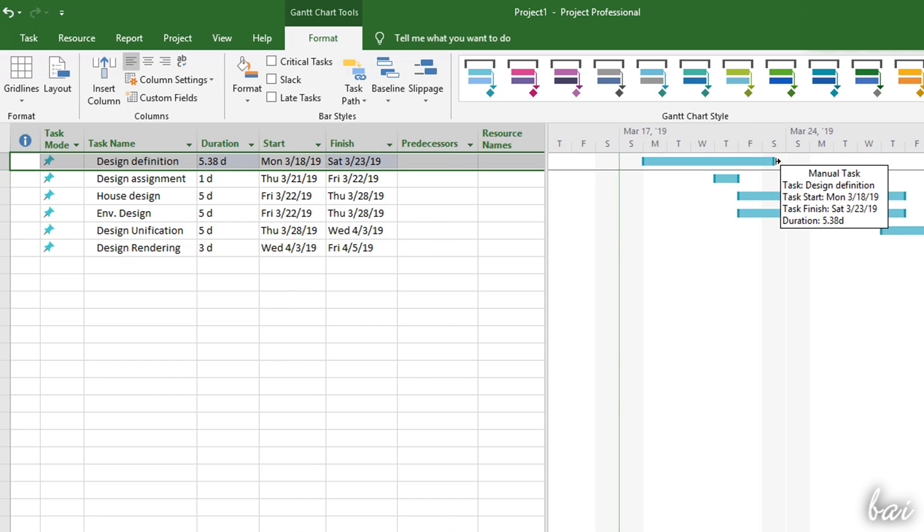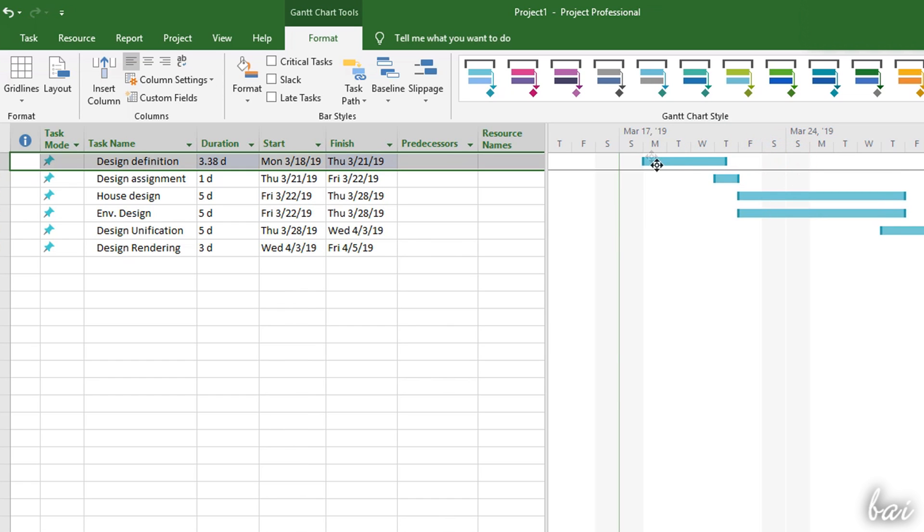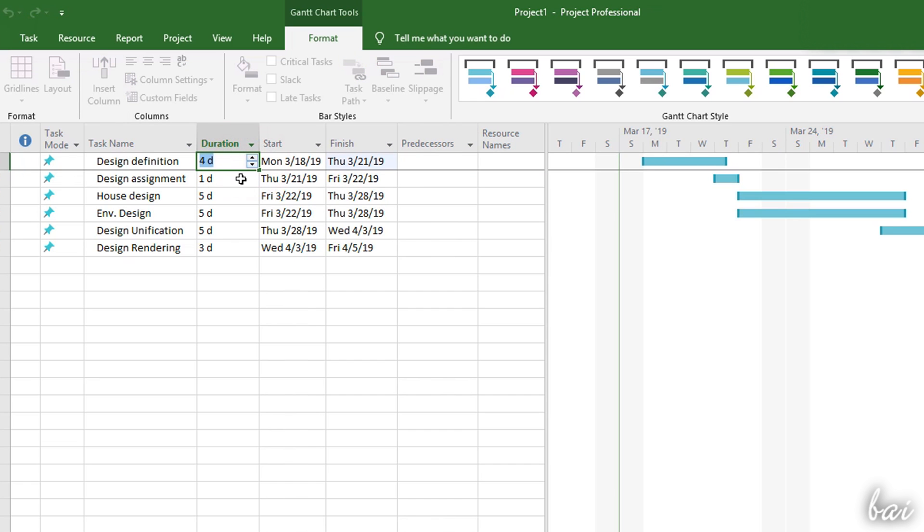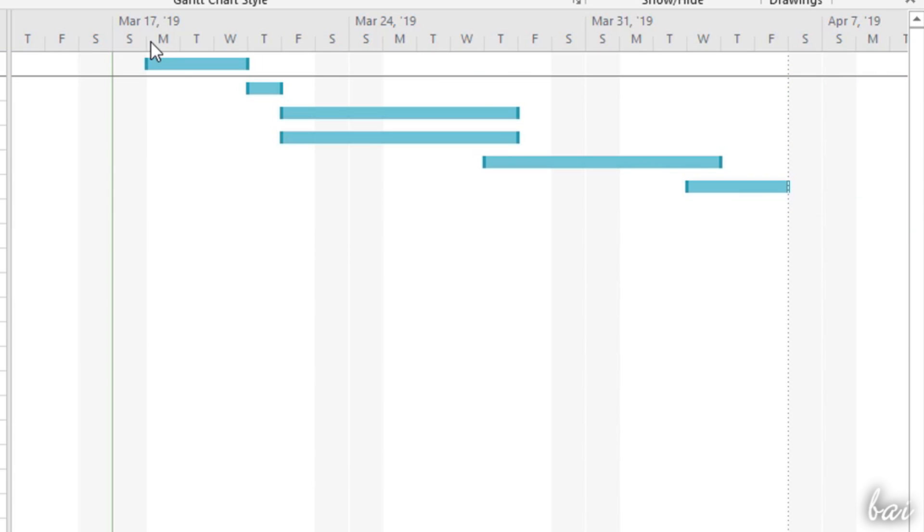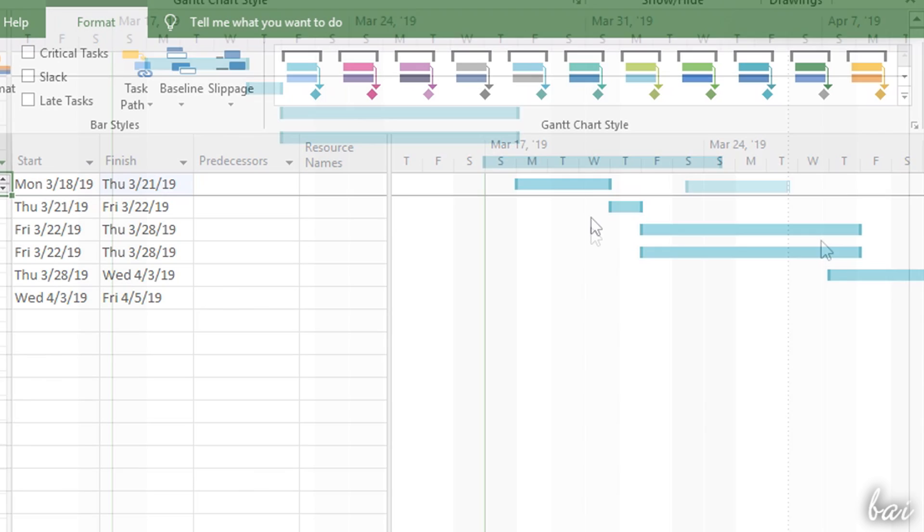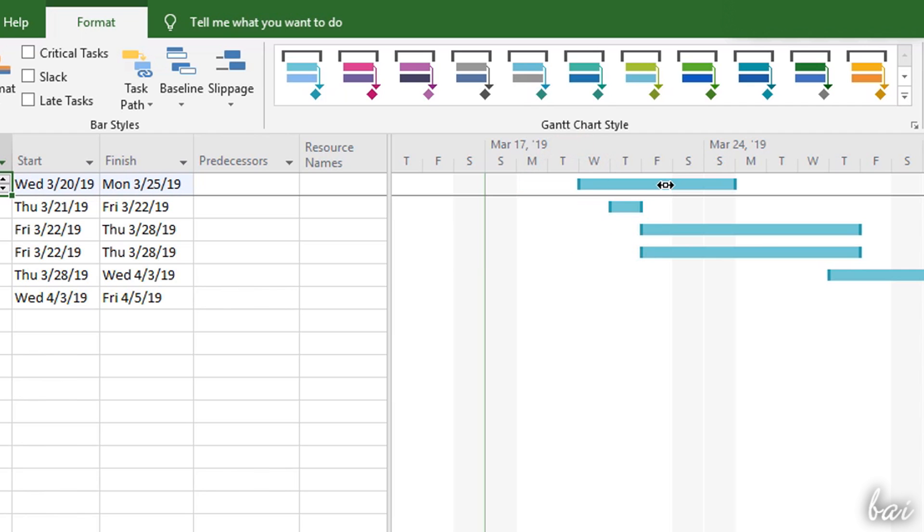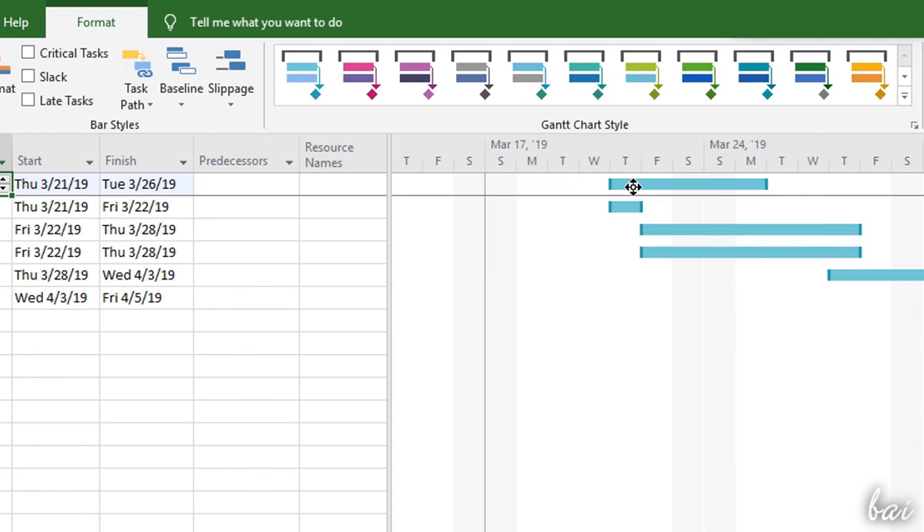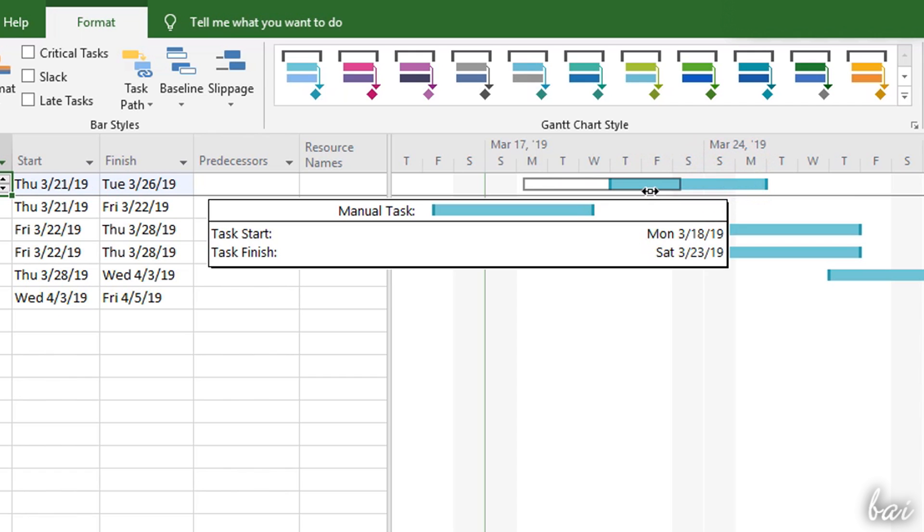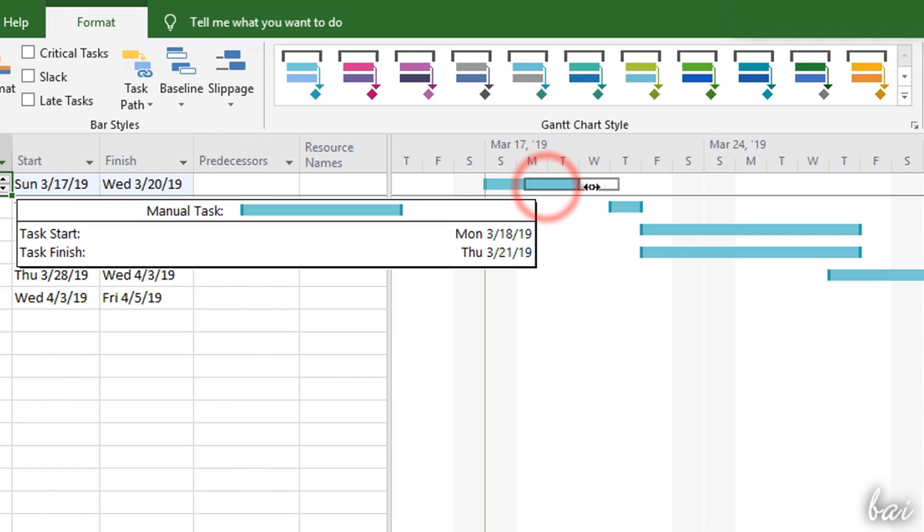The task duration is measured in working days between the start and finish date, from Mondays to Fridays. These are showed as white columns on the Gantt chart, whereas non-working days such as Saturdays, Sundays and holidays are represented as gray columns. In case any task goes across these columns, this gets extended in time, but its duration and working days remains the same.